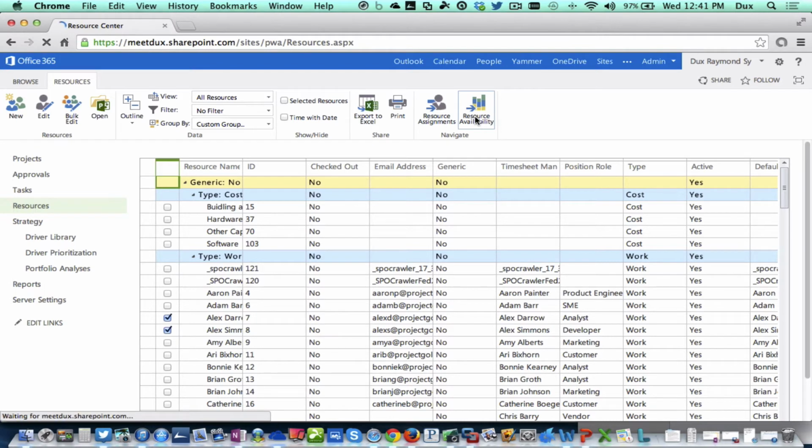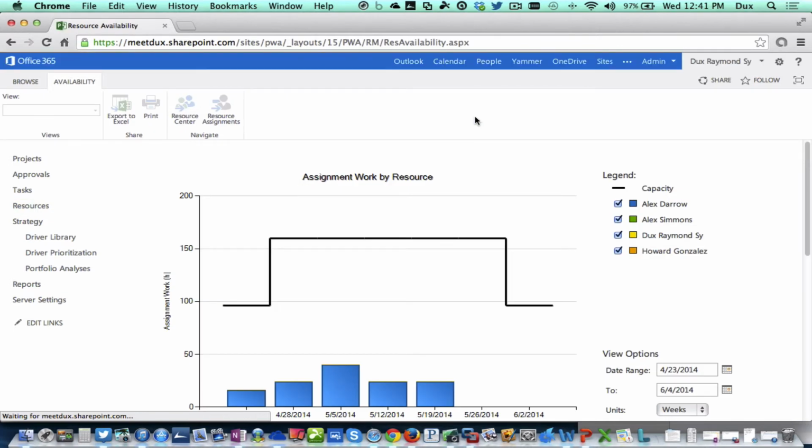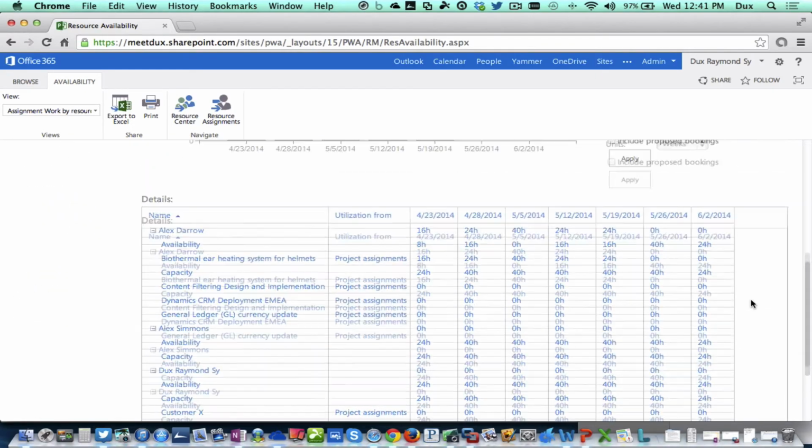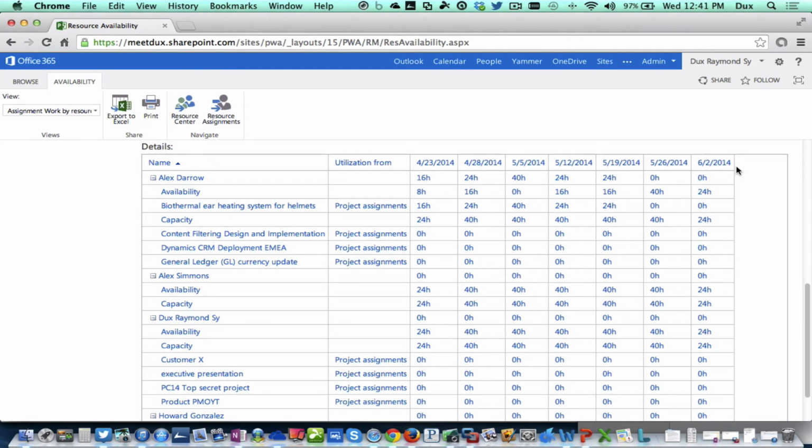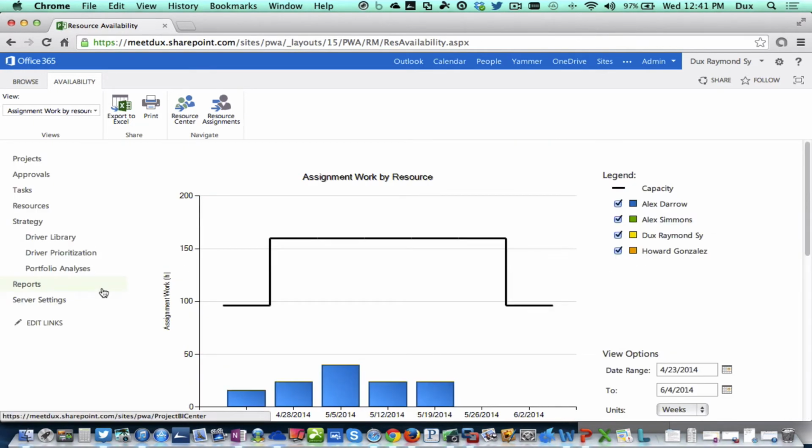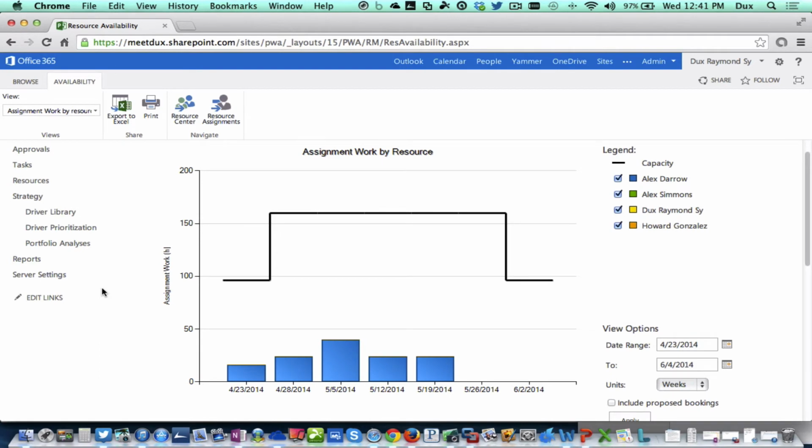So real time, I picked like 3 people. I can pull up information. It will show me a real-time report on what these 3 people are assigned to, what they're working on between a time frame. So it's a nice little chart. So between this date range, Alex is working on these projects. He's assigned this much time to work on it, and you can even show the actual work to show what he's done or she's done already, and you can drill in, and this is all real time. So you know, again, executives or resource managers or line managers can look at what their people are working on. And then you can also look at this and say, there's a new request from the business, hey, we need you to build 3 more things. Well, no, we're over capacity, we just can't do it. Either you give me more money to hire people or get contractors, whatever.